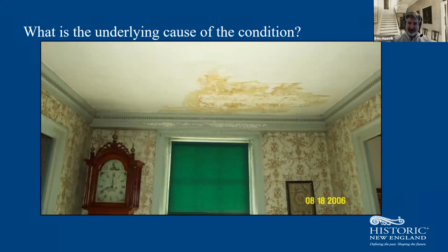We're going to fix the roof first. And then 2 years from now, we're going to paint it. And they're all like, but I had to fix the water, and I had to make sure the water still wasn't getting in. Otherwise, I was just wasting the money on the interior finishes. So you have to think that through. If I had just painted this, the stain would have been back very quickly.